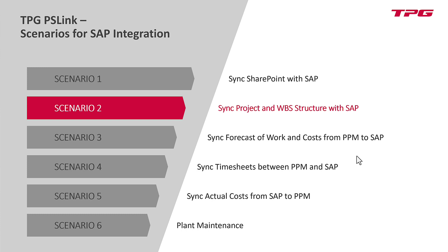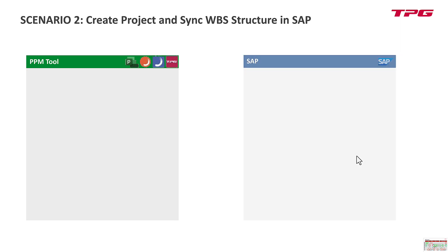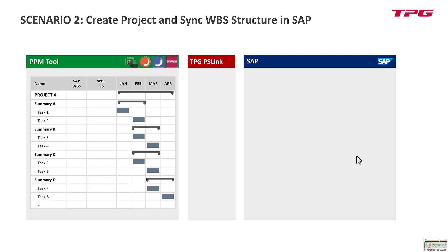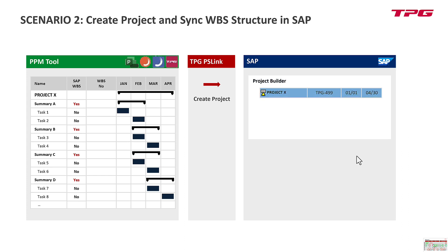Use case: we synchronize project and WBS structure with SAP. We start in the PPM tool with SAP and TPG PS Link in the middle. Starting with the project in Planisware Enterprise — one example, it could also go the other way. We create a new project, using user attributes to define which parts of the schedule should be transferred to SAP. We press a button, PS Link creates the project on the SAP side, and we get a new project definition — for example, TPG 499.